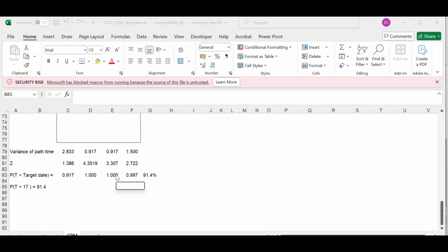Now let's talk a little about project costing. Budget and cash flow cannot exist, one cannot exist without the other. That is, budget and cash flow should always coexist. Three activities in project costing are preparing the budget, preparing the cash flow, and preparing the funding. Preparing the budget involves post budgeting in the project budgeting. It has sub processes like planning the budget, estimating the budget, preparing the budget, and controlling the budget.